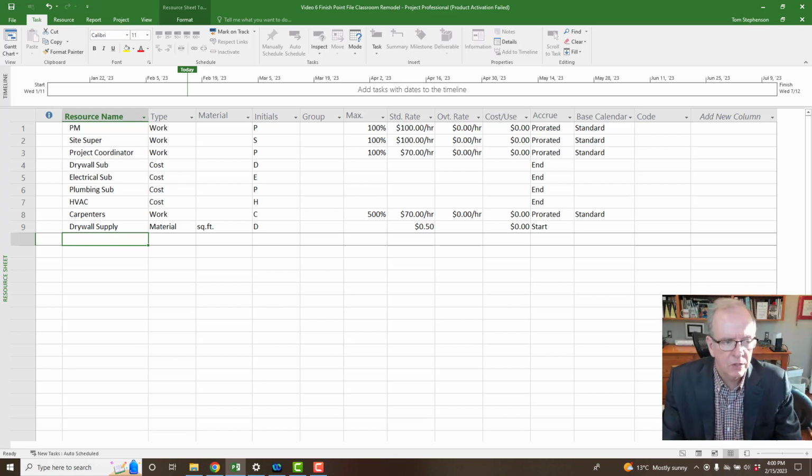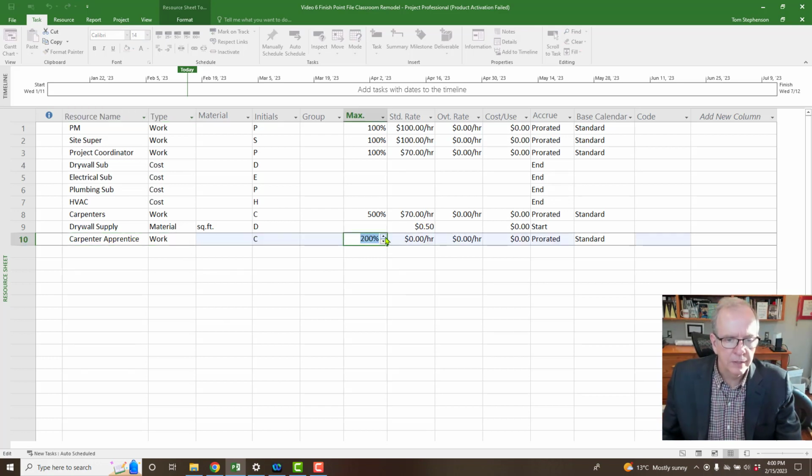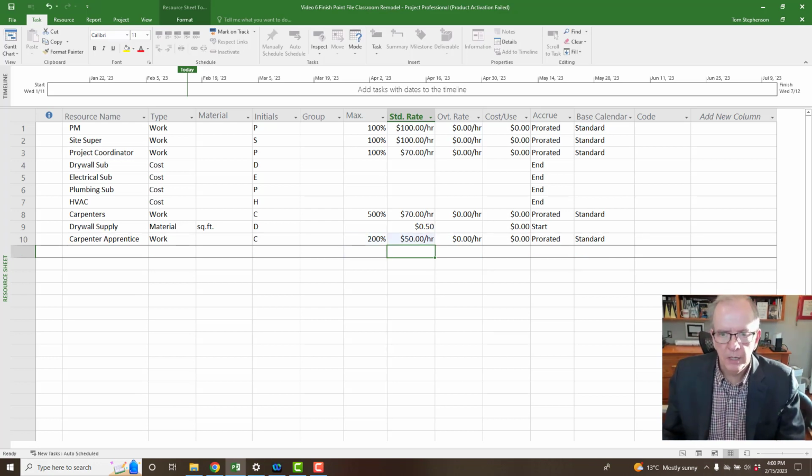So let's maybe just call it carpenter apprentice. How's that? So we'll call it carpenter apprentice. And we will call that work. And we'll say that we've got 2 apprentices available. So we'll put 200%, and we'll give them an hourly rate. So we'll say $50 an hour, okay, for an apprentice just starting out.